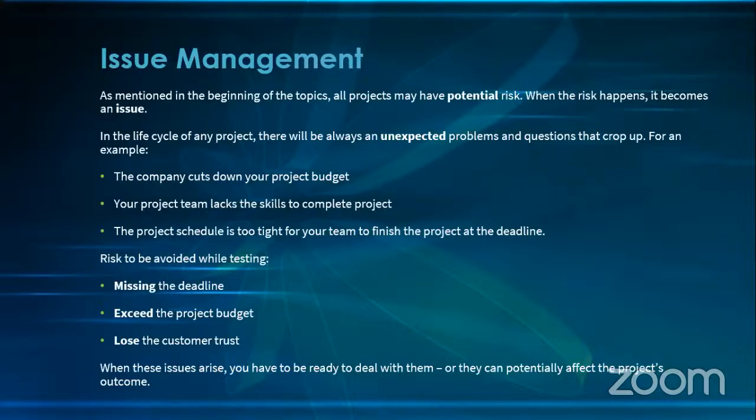But others, you might add some more days. Maybe you want to work weekends. You need more people, more helping hands. All this can help you with the deadline. And when they say exceeding budget, if you bring people in and you finish quickly, you might still fall within the budget. But if you have one person that is taking long to finish things, it might take time.